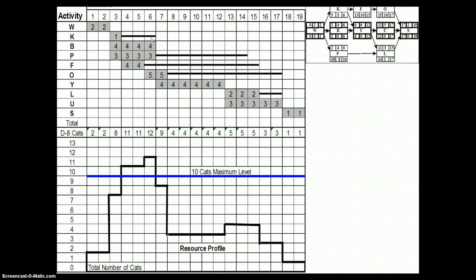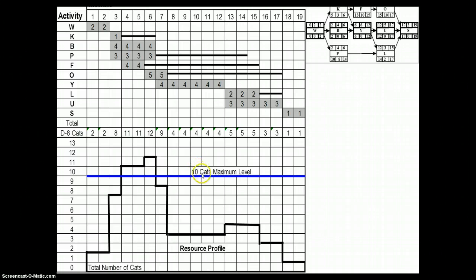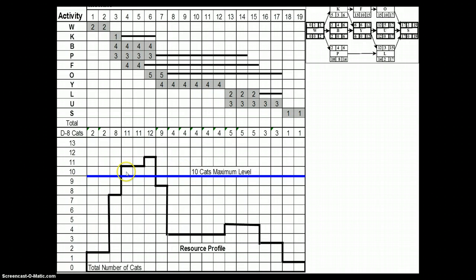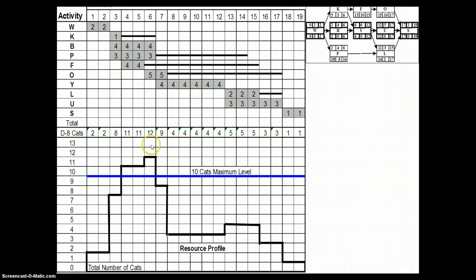There is a constraint facing this project: only ten caterpillar machines are available. You can see a clear problem running through month 4 to month 7. We have got a resource requirement which is much more than what is actually available.